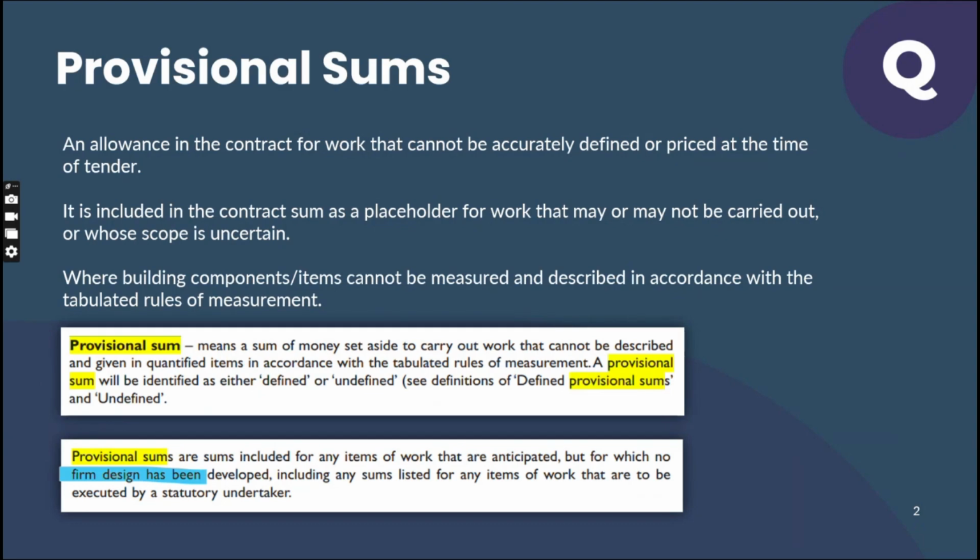If you provide tender documents with missing information, the poor contractor will not be able to price it accurately. Just imagine you are preparing the design documents, but many design elements are missing. You haven't given him the specification details, the manufacturer list, or the design criteria. Many things are missing. So how do you expect contractors to price those items?